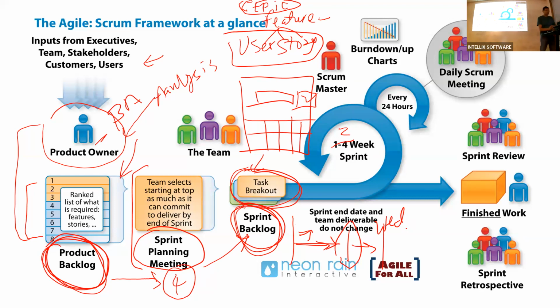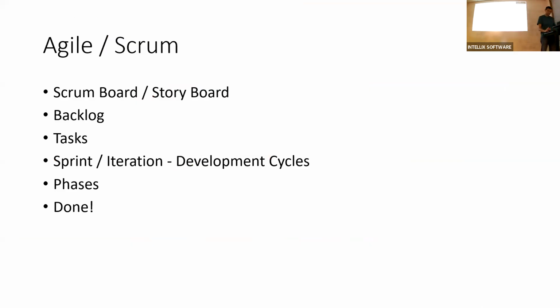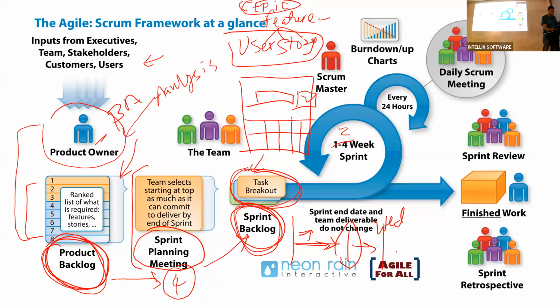So Wednesday to Thursday, you do UAT as well, and when everything is good, you deploy to prod. Again, you cannot skip any step in the SDLC. You have to follow the steps, but the only thing is that you do it within 2 weeks, for a small piece of functionality.